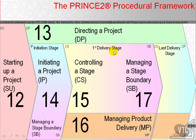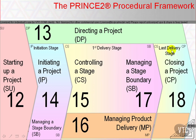It may be that the first specialist stage is also the last, but even if it is not, there will always be a last specialist stage. Again, its internal structure will use the controlling a stage and managing product delivery processes to conduct the specialist or technical work. The last specialist delivery stage will end with four of the five activities of closing a project. Closing a project and managing stage boundaries are very similar — they bring stages to a close, either as planned or prematurely, and they prepare for whatever is next.